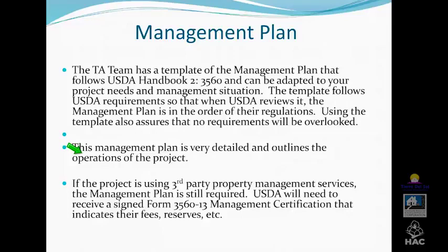Once the award is made, the pre-construction conference is scheduled with the contractor and the state architect. This is a meeting where you, the state architect, your architect, and the contractor sit down and you go through the entire USDA draw process, what's required on site in terms of signage and fences, and the Davis-Bacon is reviewed. This can be done prior to the USDA closing, and we covered that in the previous one, but